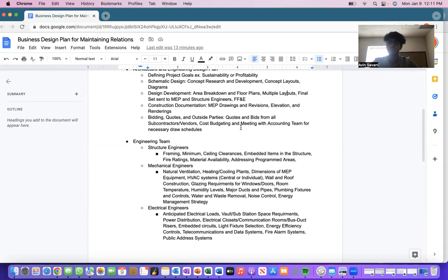So upon inspecting the property or the project, how much they have completed out of the necessary scope of work, that's what percentage they're getting paid that time period, right?